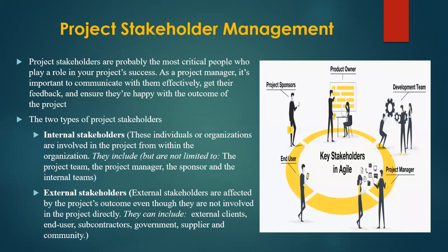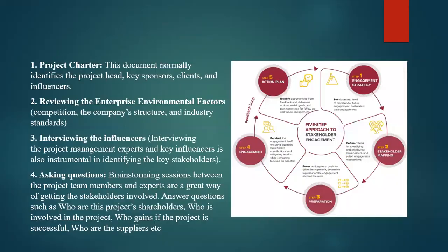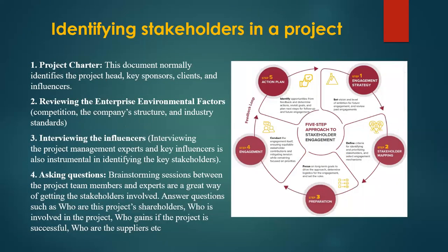Project stakeholders are the most critical people who play a role in any project success, and the project managers must communicate with them effectively and must be able to differentiate between internal and external stakeholders. And in order to identify these different stakeholders, we can use different documents and techniques such as project charter, enterprise environmental factors, interviews, questioning these stakeholders.